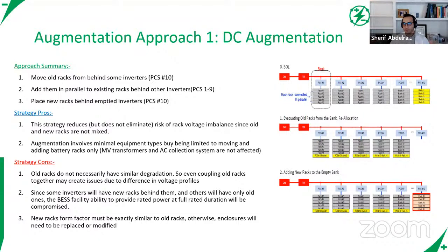So that was really one of the challenges we had when we were starting this energy storage program. Everyone in the industry, or really developers, knew exactly what they wanted to do with their batteries because they're planning for a certain service. But we as a regulated utility wanted flexibility. So we spent months and months negotiating what is now very well known as flexible performance guarantees with battery OEMs. But that's for the execution phase. When you have a purchase order in hand and you're talking to a major battery OEM like Samsung or CATL, and you tell them we want that flexibility, they will work with you.